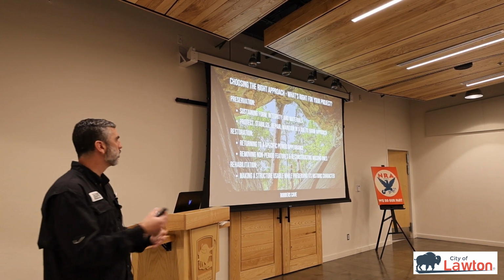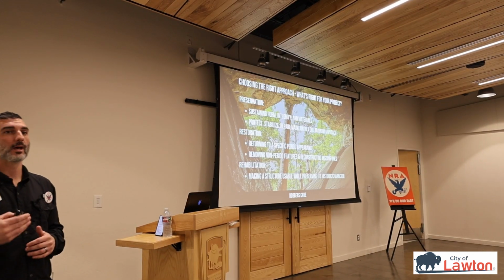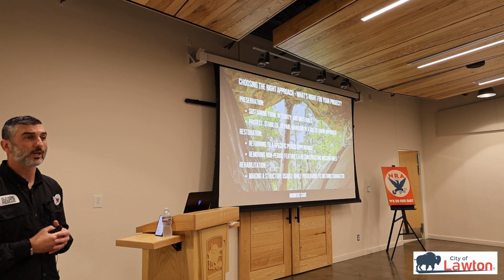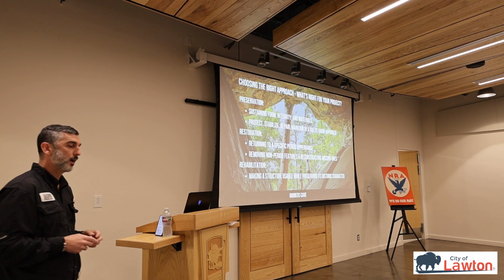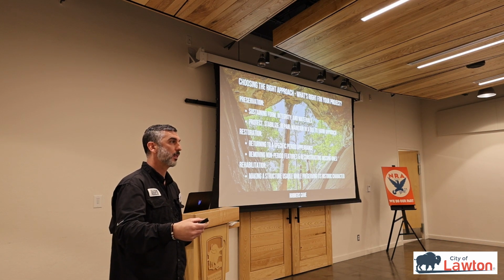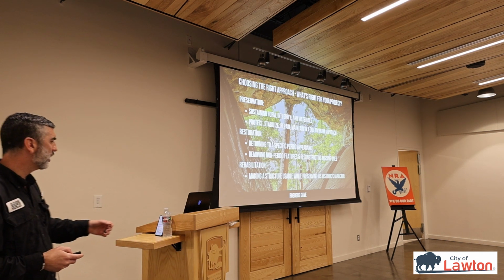So how do we incorporate new building materials into the old? And then what happens after this? Because great, we raised $1 million, we're going to do this project. How are we going to spend the 2 to 4% of the building's cost that it takes for annual maintenance alone? And if we don't have all of those cost considerations in mind, we may need to tailor what we're going to do with it.